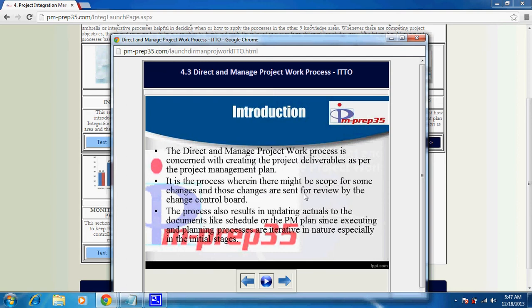When you use the word execution, it can be part of any phase of the software development life cycle. So the concerned team which is executing that work can uncover some changes which can affect the baseline of the project management plan or some other plan. So when you say baseline, the total plan can change. Those change requests are not yet approved. Only when they get approved do the baselines get revisited and the requirements or the plan get changed. So the change request can be uncovered.